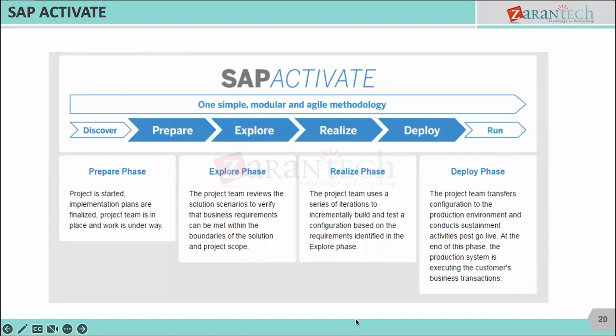That is the phase where the configuration starts, of course, and normally in the previous traditional approaches, for example, you are given 5 months of timeline for project configurations, say 20 weeks. Almost 16 weeks the team will utilize for configurations, and on the 16th week sometimes we come in front of the client saying that this is what we have developed, and then we expect them to do training, testing and all.